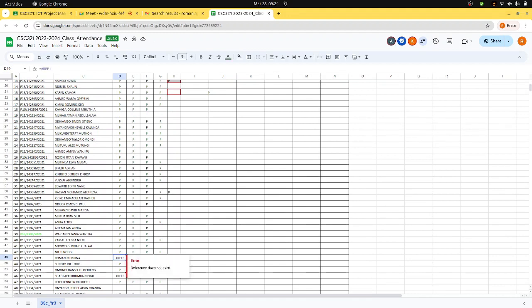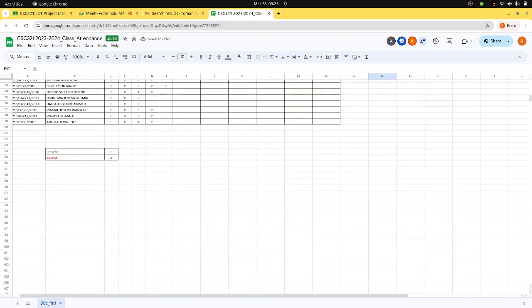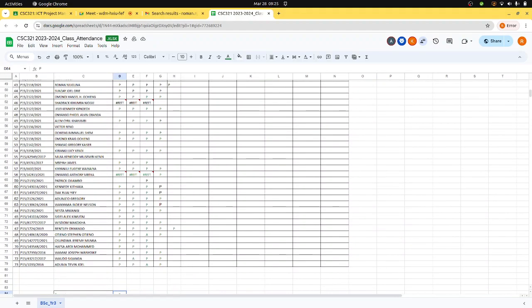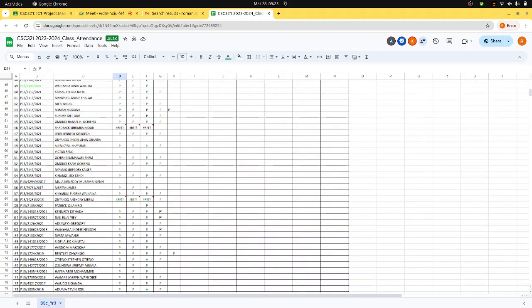and you tell the customer, you are a civil engineer, you tell the customer, I want us to start this project between September and December, because that is the dry season. But he insists, and you tell him between September and December, we'll finish this bridge in 3 months. Then he insists, no, people are suffering. I want this bridge to start in June.